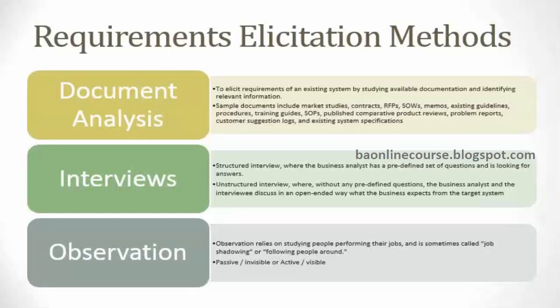No. First, we would ensure whether it is agreed to be accepted or not. I think you send it to the senior management and see if they approve it or not. What is that team generally called? This change authorization board. Yeah. Some organizations have a change control board, some call it a change authorization board. But there's a set of people identified, right? So you need to be clear who is going to approve it.